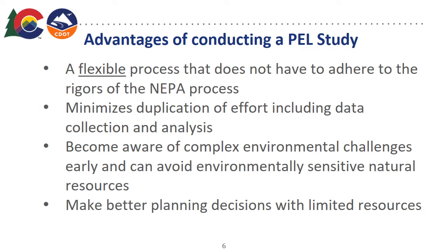And where it does save a lot of time, however, is when a PEL spawns several NEPA projects along a corridor. After the initial NEPA project after the PEL, the subsequent NEPA projects tend to go very quick because a lot of rework is being eliminated.